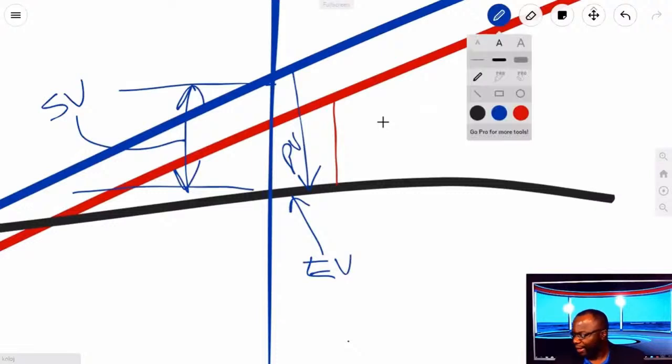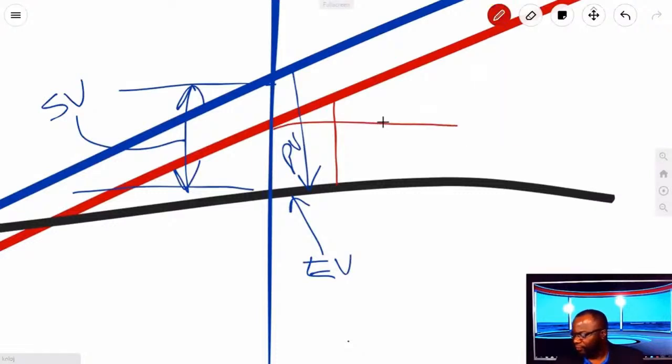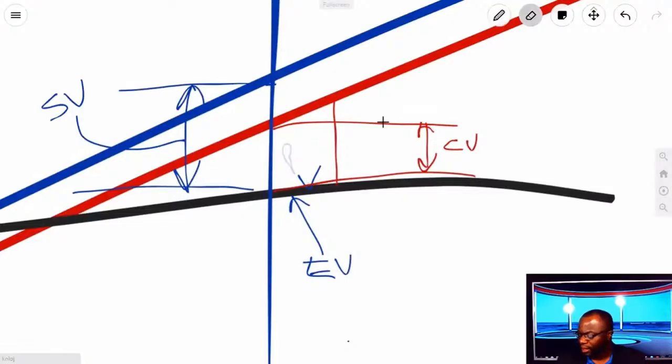If you take a look at this, you got a variance, you got that cost variance going on, and it's not in favor of the earned value. See? So anytime your earned value line is under PV or under AC, it means you have issues. Okay? And those issues are summarized by you observing those variances. You got a schedule variance which is negative. You got a cost variance which is negative.